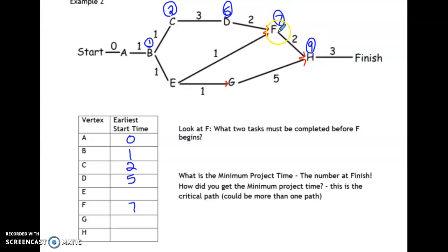Now you see we have a couple arrows, multiple lines coming to these vertices. So we may end up needing to cross off that 9. We'll see. All right, let's go to a different path. A different path would have been you bought the film and then you loaded the camera. So B to E, we loaded the camera, which took a day. So before I could ever start E, which was taking photos of teachers, I had to spend 2 days buying and loading the camera.